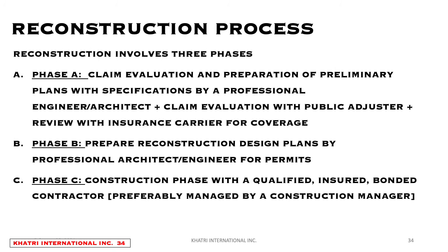When we get to the reconstruction process, if you have a situation where you've had storm damage or balcony damage or any type of failure, go through what I call the ABC process. Phase A, evaluate the possibility of a claim and prepare a set of plans by a professional engineer or architect. File a claim if you feel there is coverage under a policy, hire a public adjuster and get coverage.